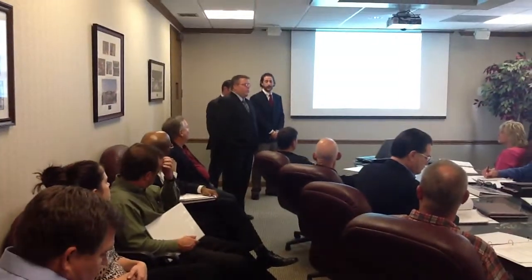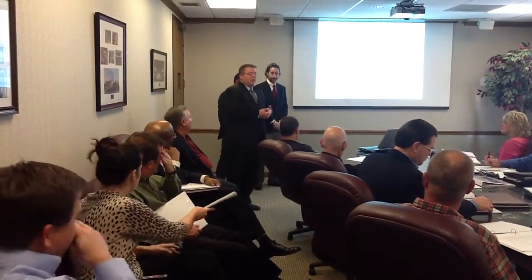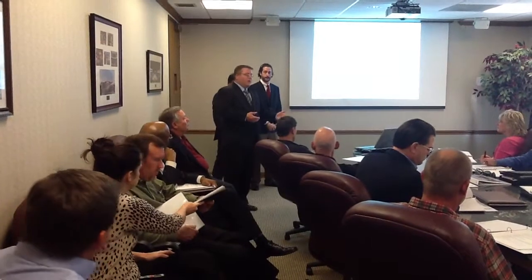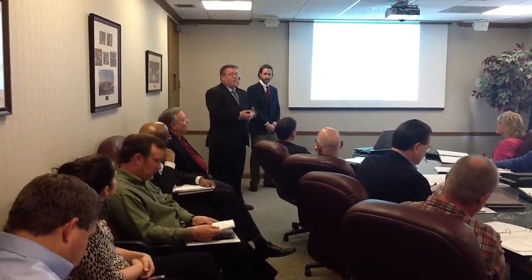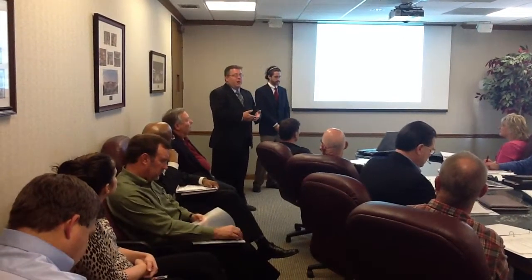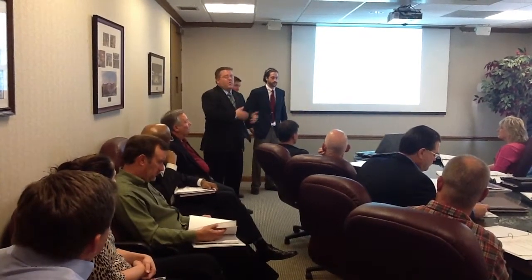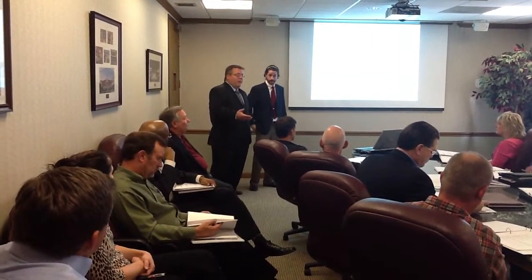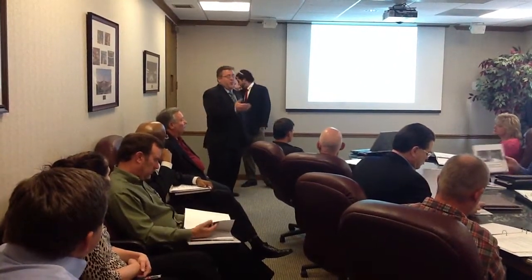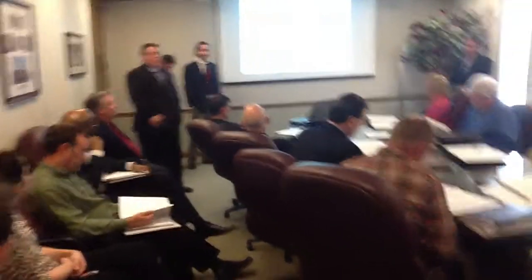Yeah, quality on site is very important. One of the ways that I'll do that on site is I'll go out every day, inspect the job, see what's going on, watch the subcontractors as they're performing their work. If I notice anything that's out of place or not right, if there's really bad work done, I'm going to catch that immediately and have them do that right then. That's very important because if you wait, you don't do it, you'll have a problem later on. So it's very important to stay on top of that every day. And having our weekly meetings with suppliers, that way we'll be able to address any issues between subcontractors and our scheduling meetings.